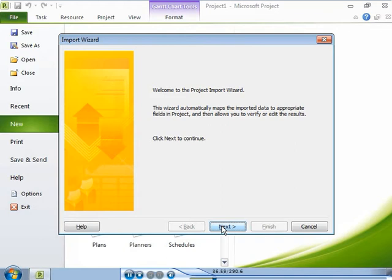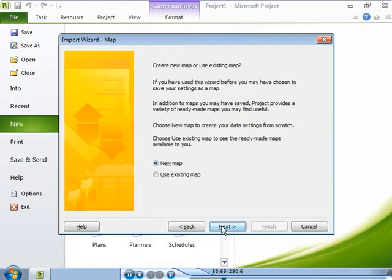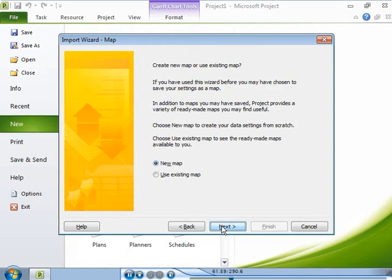The import wizard guides you through the import process. The first step is to map the data in the workbook to the appropriate fields in Project 2010. You can create a new map, use a predefined map, or use an existing map that you saved earlier to import data from the workbook. The import map determines the type of data to import and the correlation of fields between the Microsoft Excel file and the fields in the Project 2010 file.